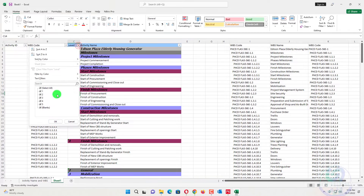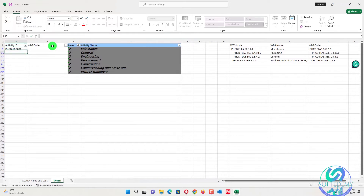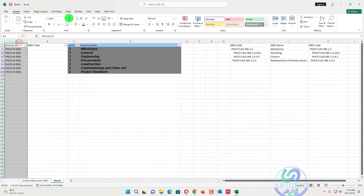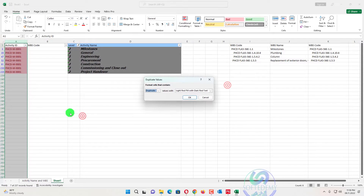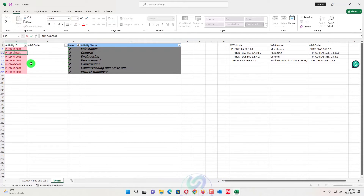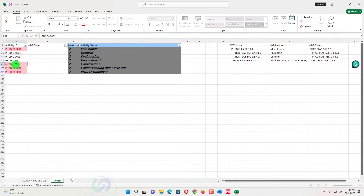The next step is to create Activity IDs. Activity IDs are simple — I will create them based on Level 2. In front of Level 2, I will create IDs like 'PHCD' (the project name), then for milestone 'M1,' and so on. I will format these to flag duplicates in red if any exist. I will assign: G for General, E for Engineering, P for Procurement, C for Construction, O for the next one, and R for the last one.